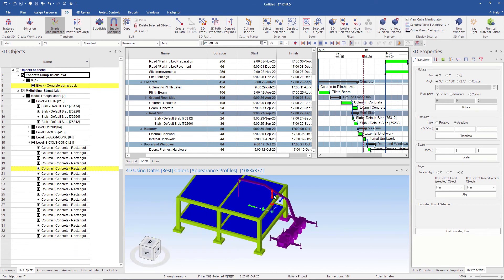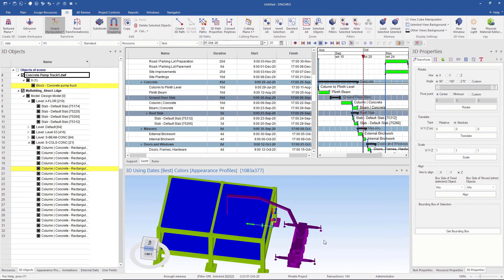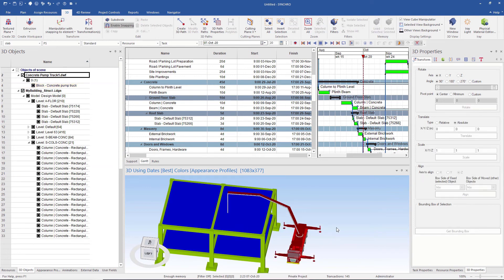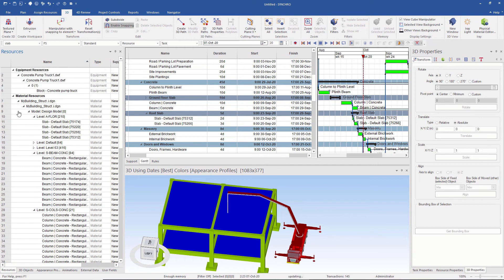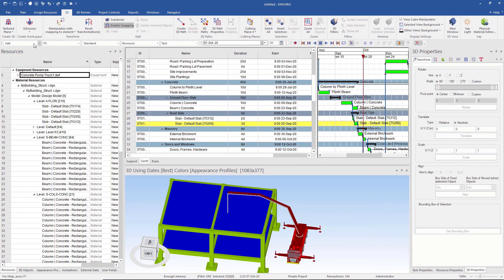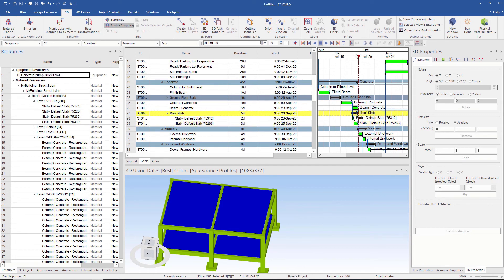After fine-tuning its location, I will assign this equipment resource. I want the appearance profile to be Temporary, because equipment only stays during construction. I assign it to the roof slab. Let's see how it looks.